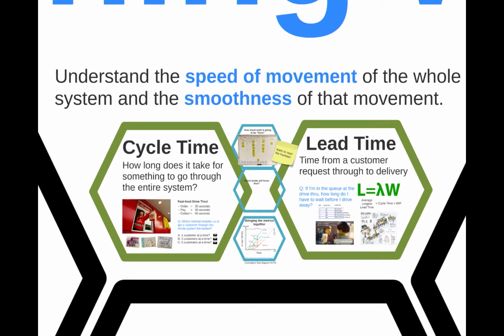Looking at flow is about speed of movement through the whole system. Now that becomes really hard if you've got Kanban for project A, Kanban for project B, Kanban for project C. Very hard to see if individuals are overloaded or doing too many things at once. Much easier when we've got one team and one Kanban and the work coming to them.